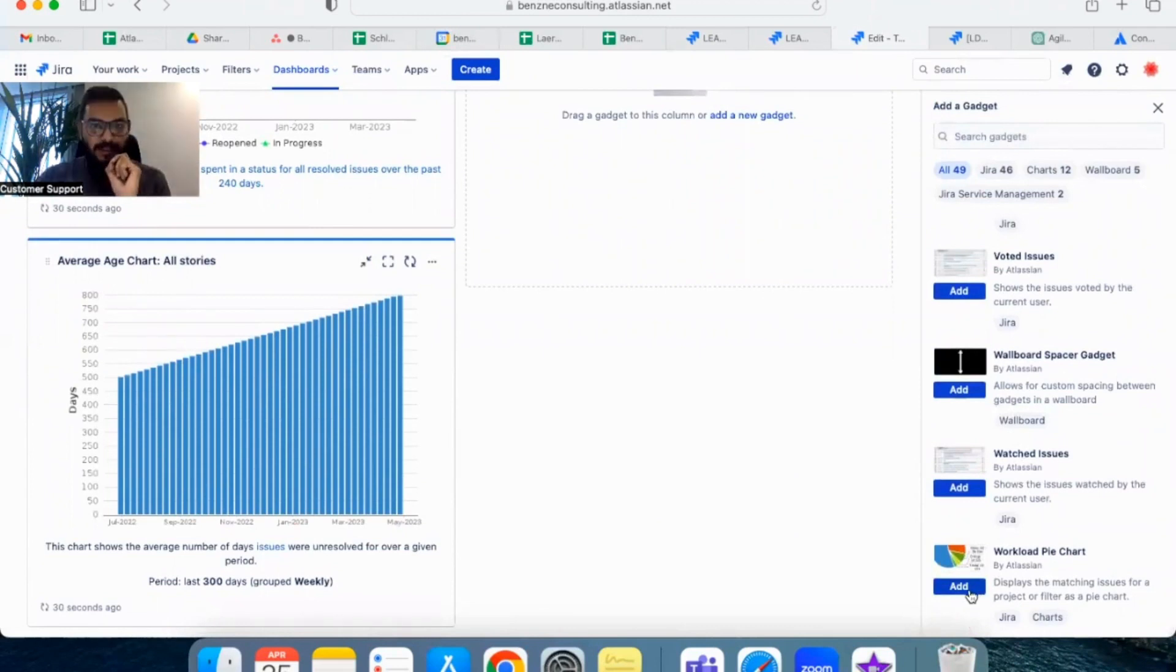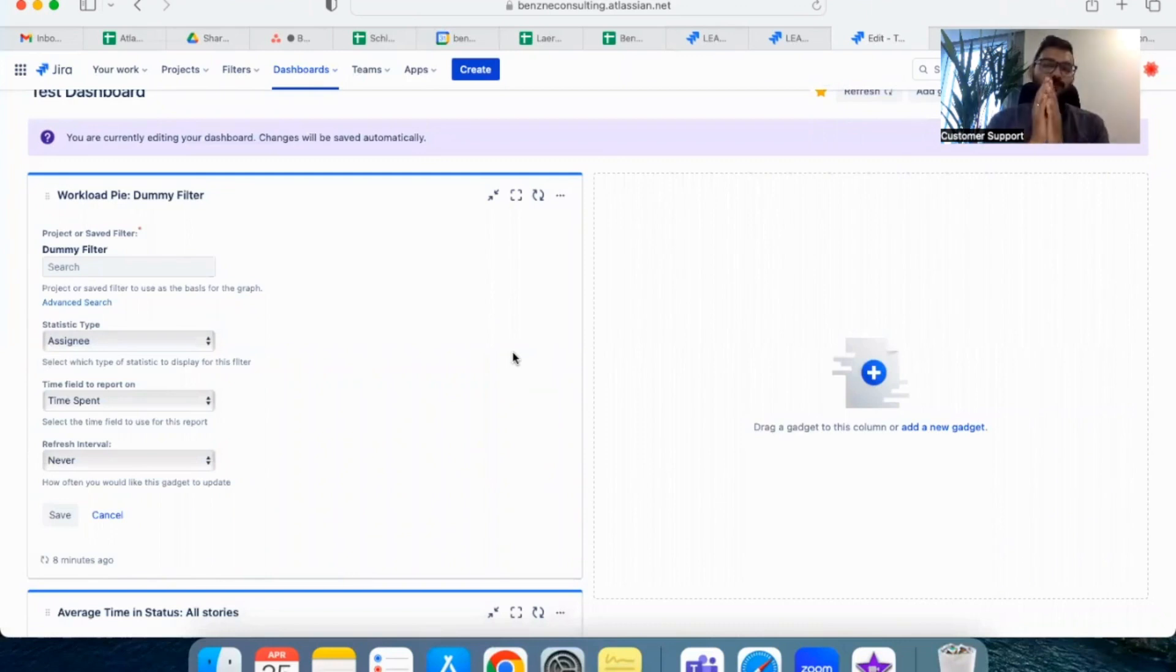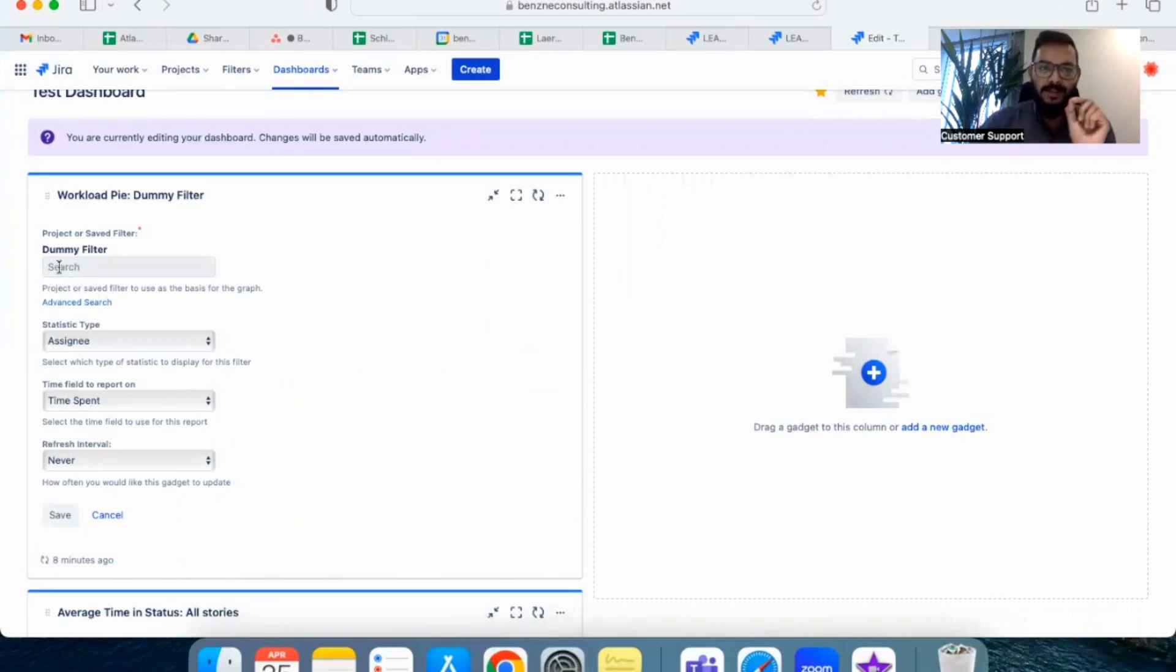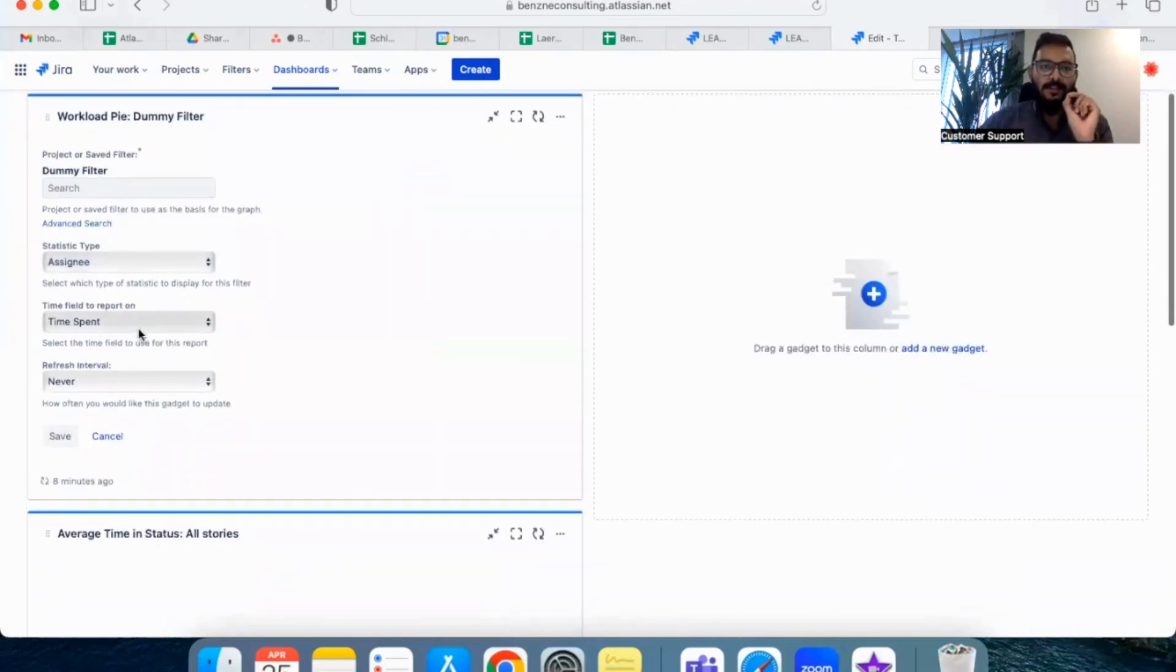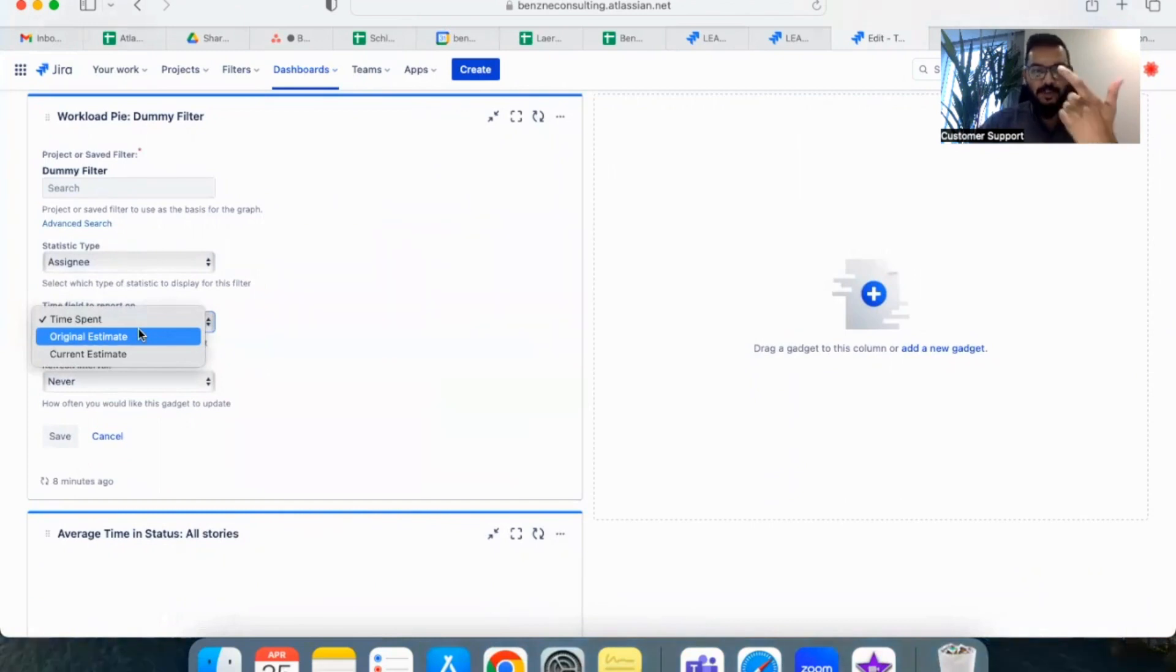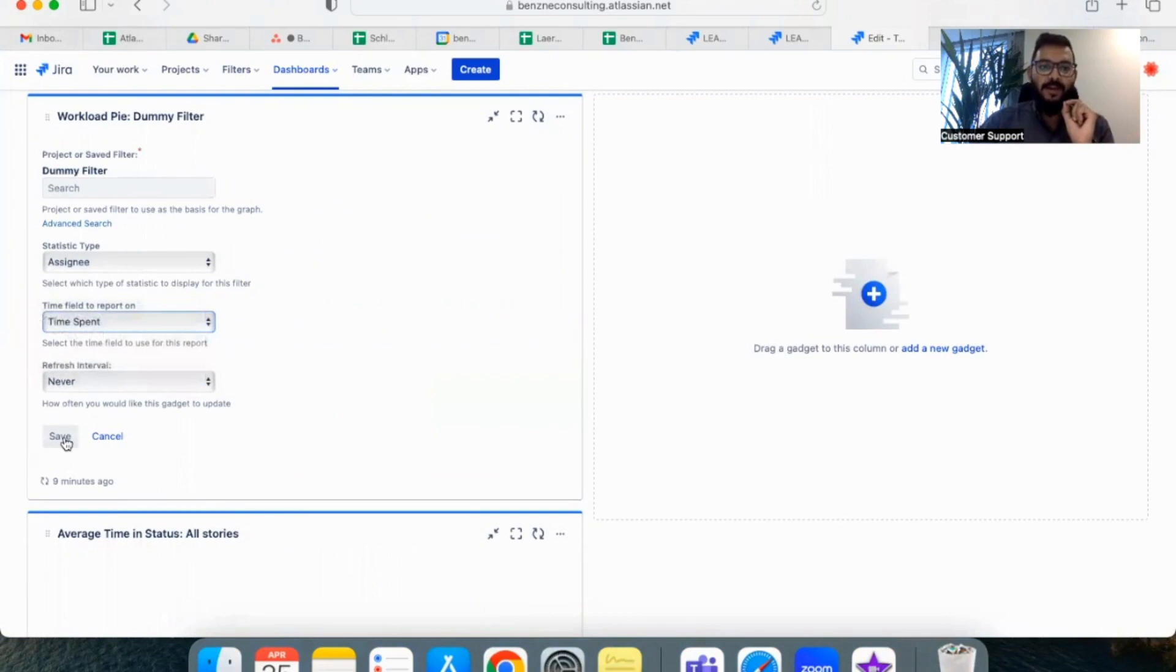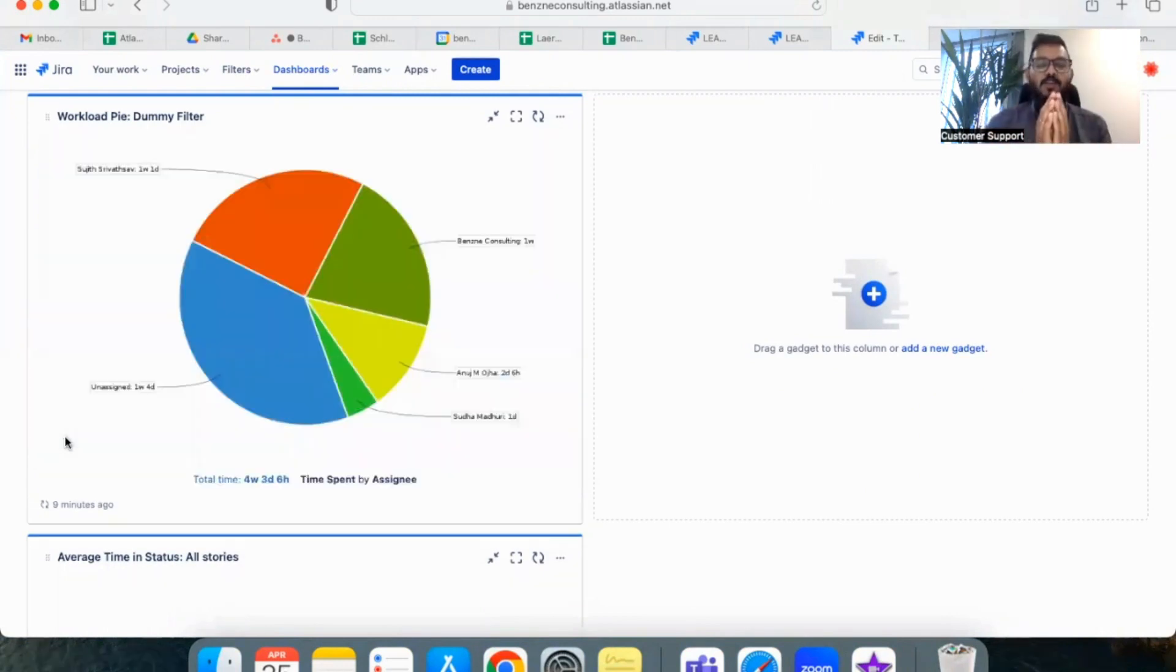Once you add the gadget to the dashboard, it is time for us to configure it. The filter we created can be added in the filter section here, and in the statistic type use assignee. There are three options you will get in the next field: one is the time spent, original estimate, and your current estimate. Click on time spent and save it.